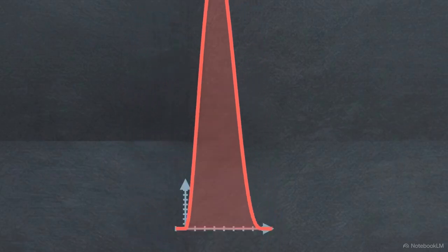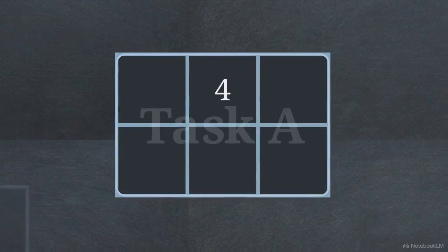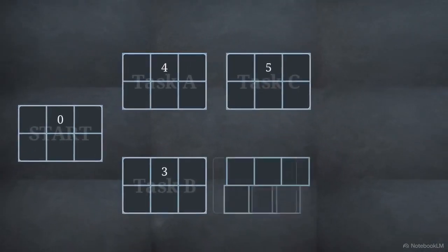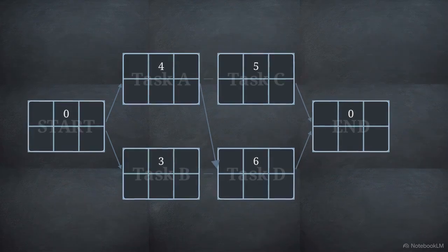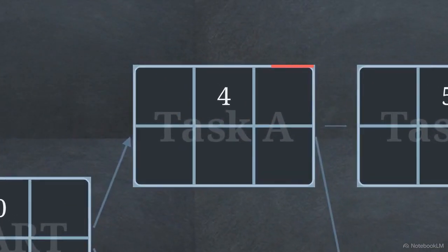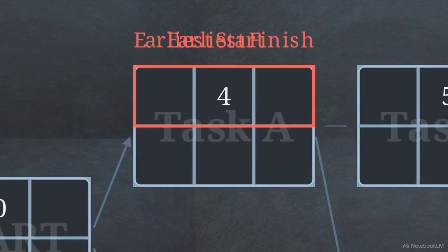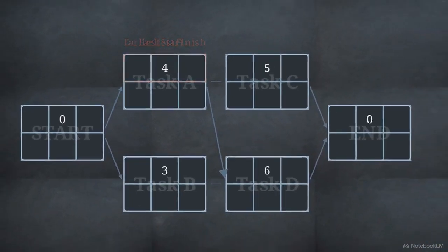When we zoom out, we see this network diagram mapping how these probabilistic nodes link together to form an entire interdependent project. To calculate the total duration of the project, we must track time through the network using 2 distinct mathematical passes. First, we look at the top row of the node, which houses the earliest start and earliest finish times.